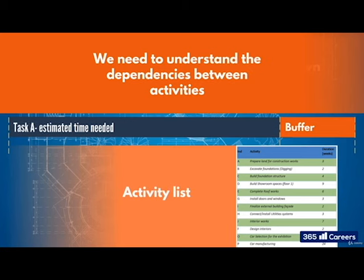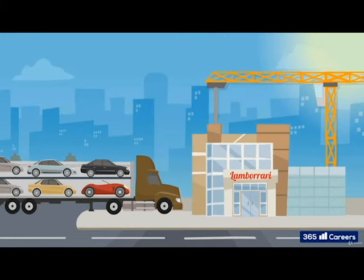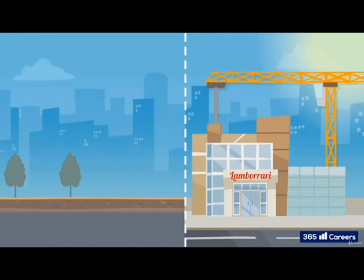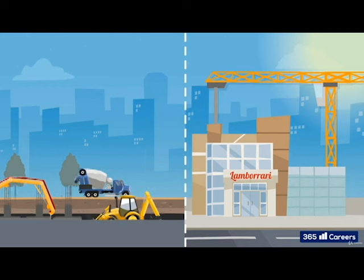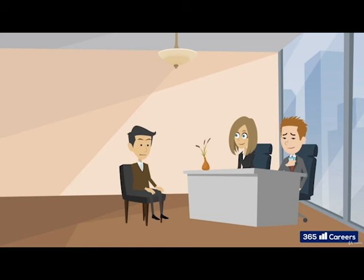It's not hard to imagine how some tasks are dependent on others. You can't have the cars delivered without a showroom. And you can't build your showroom until you've started digging. And you can't start digging until you have the machinery on site. You can, however, start recruiting the sales team. So, let's look at the four main reasons why dependencies exist between tasks.